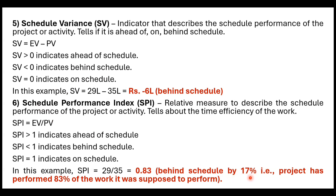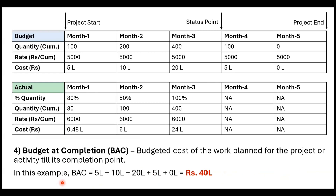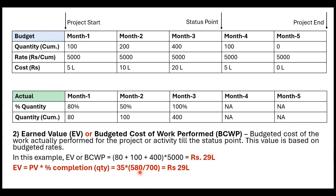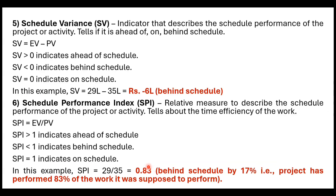SPI comes to 0.83, meaning you are lagging the schedule by 17%. You could only perform 83% of the work you were supposed to perform. This 0.83 can also be verified by dividing actual quantity (580) by planned quantity (700), giving the same 0.83. If you understand the logic there is no need to memorize the formulas.